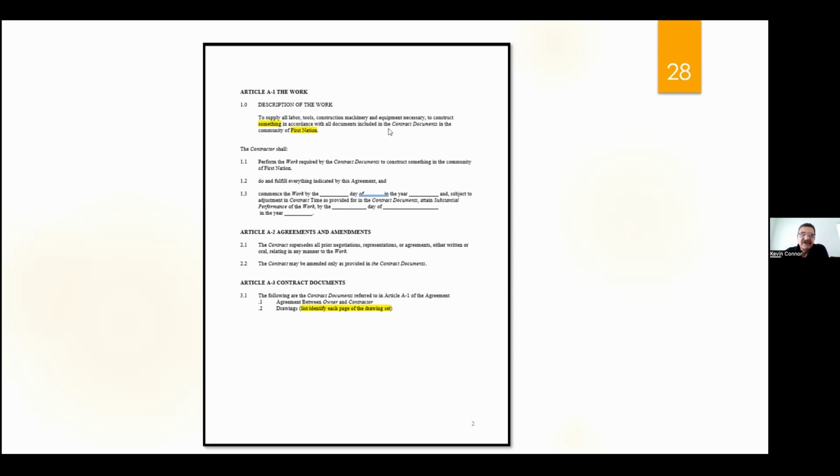Then they would support that. But generally, I don't like to use that when I'm with a First Nation. There isn't a huge kind of damage to the First Nation. I mean, if it's a Section 95 CMHC house, you've lost $350 a month for 6 houses. It's worth $1,800, right? It would cost more to go to court than it would be to try and collect damages. But again, it's there. It's available if you think it's something you need to use.